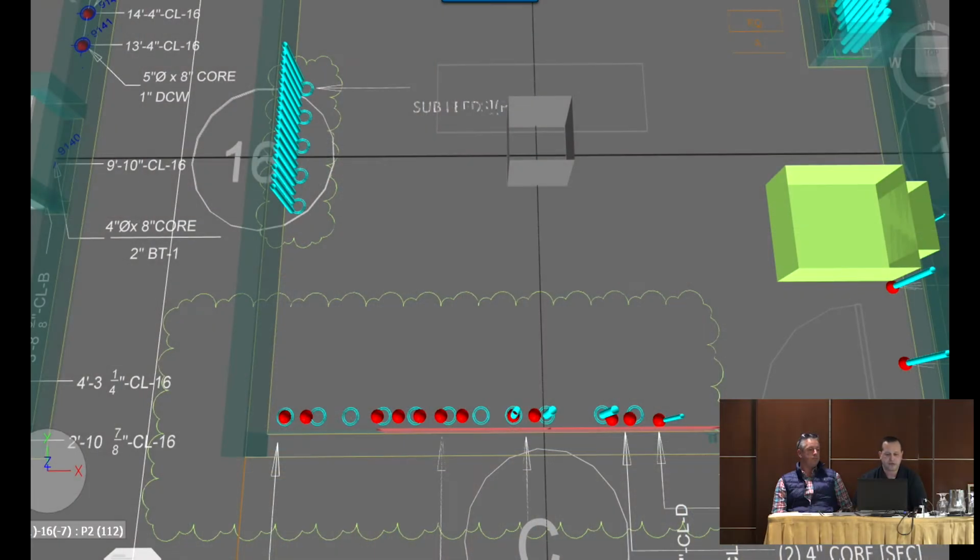Now, after the fact, we'll go through in the field and do a cleanup process of these levels. I'll show you a couple more examples here. This was the electrical, so the red represents the initial layout, which for some reason, I think there was some discrepancy or misunderstanding when we first submitted. The initial layout was incorrect, which is what you see in the red. The blue or cyan color is the new layout with the cores further spread out. So again, Davis will just go back and reshoot those points, and everything will be in the right location.